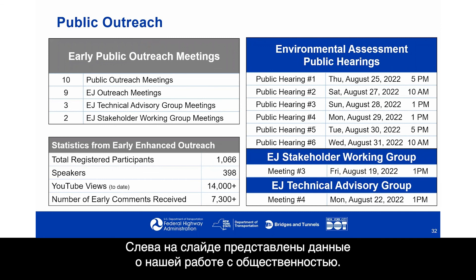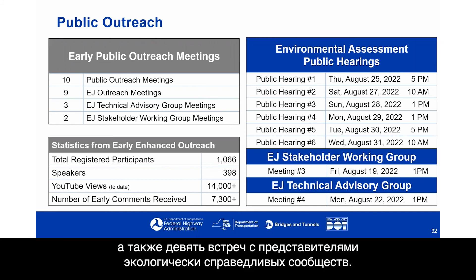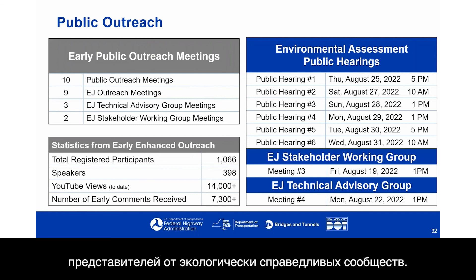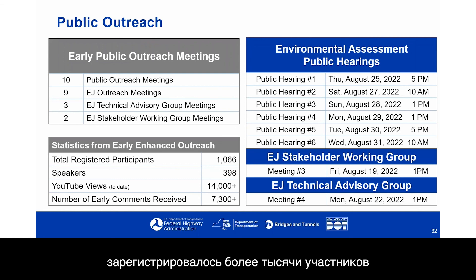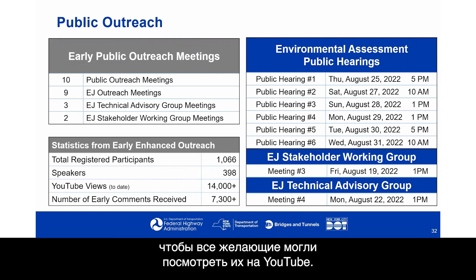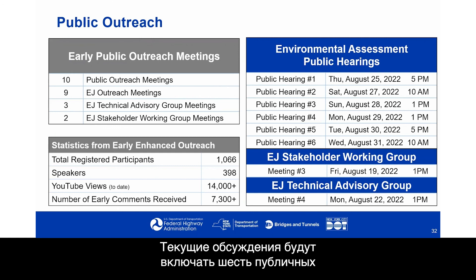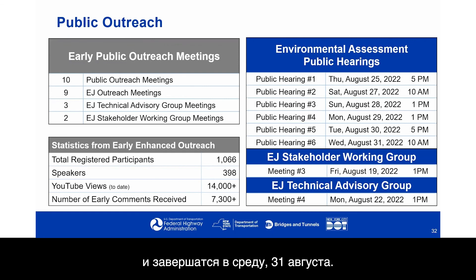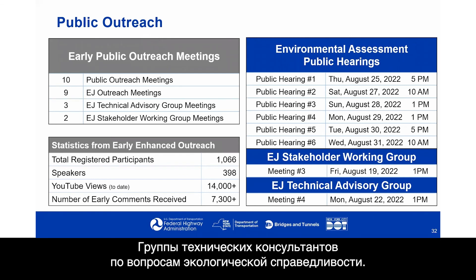Information on early public outreach: during that period, 10 virtual public outreach meetings and nine environmental justice outreach meetings were held, along with three meetings of the Environmental Justice Technical Advisory Group and two meetings of the Environmental Justice Stakeholder Working Group. During the 19 public outreach and EJ outreach meetings, over 1,000 participants registered and nearly 400 speakers participated. Sessions are available on the project website and YouTube, with over 14,000 views and over 7,300 comments received to date. Current public outreach includes six public hearings from August 25th through August 31st, plus additional Environmental Justice Stakeholder Working Group and Technical Advisory Group meetings.